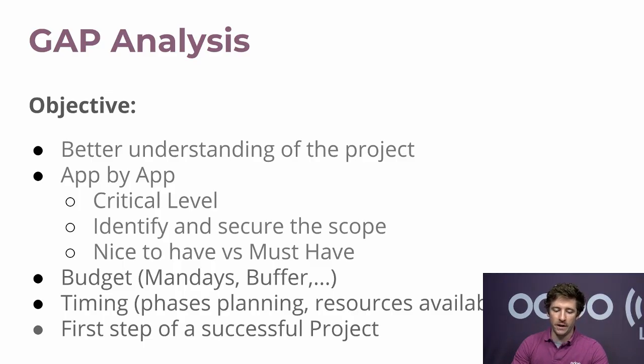Budgeting means that you will be able to tell your client how many man days it will take to develop every single functionality, eventually forecasting some buffers if you need to have a proper budgeting. With that budget and the time needed in man days for every development, you will be able to time it as well and prepare the phases planning of your project.